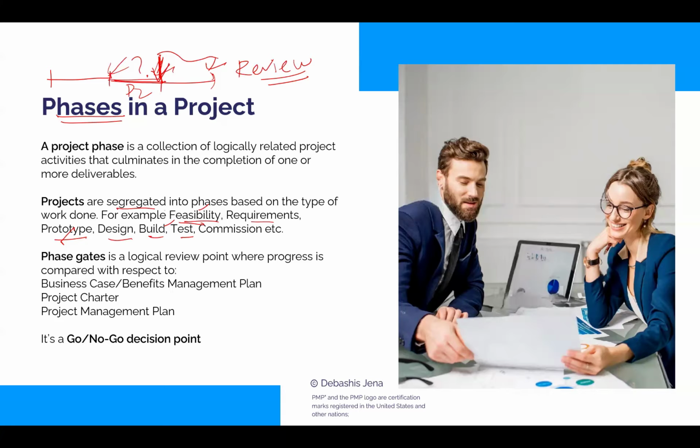Then, end of a phase is a go, no go decision making point. We'll check if justification is still there or not. You remember, we spoke about business case yesterday, which we create before initiation to check justification. Only if there, we would start a project. Do you realize, let's say we started a project, there was a very nice business case. After a couple of phases, due to developments, internal developments, external developments, the justification may be affected or may be completely gone away. Can happen. So we must check end of a phase, is there justification to proceed with the project or not?